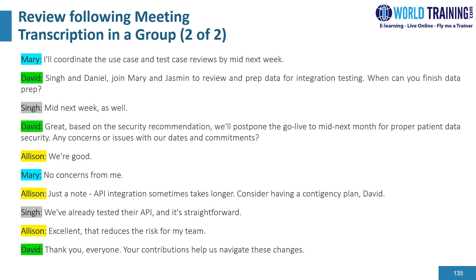David: any concerns or issues with our dates and commitments? Allison: we are good. Mary: no concerns from me. Allison: just a note — API integration sometimes takes longer. Consider having a contingency plan. David: excellent. We have already tested their API and it is straightforward. That reduces the risk for my team. David: thank you everyone for your contribution and help navigating these changes.